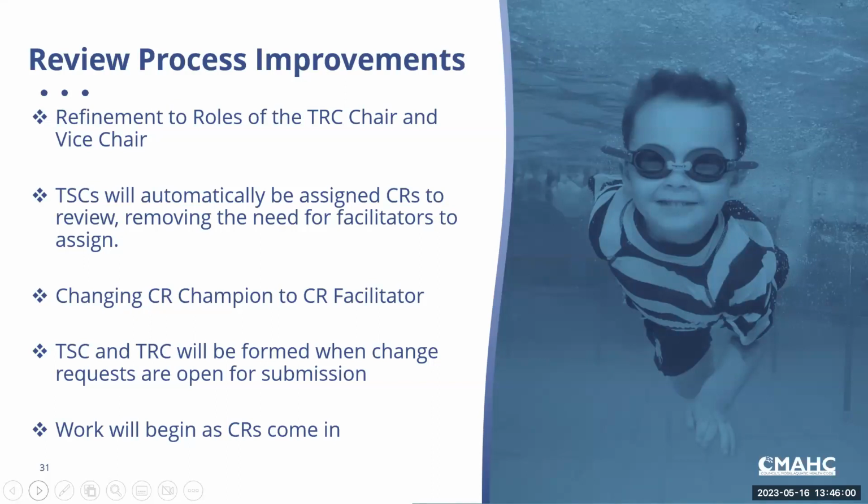So the submission window is open. It opened on April 15th, and it will be open until October 13th. The TRC and TSCs' charter of work actually extends into November 13th, 30 full days after the close of the change request window. This was very purposeful so that we had adequate time to address any submissions that came in at the very last minute. So we're not having to rush through it.